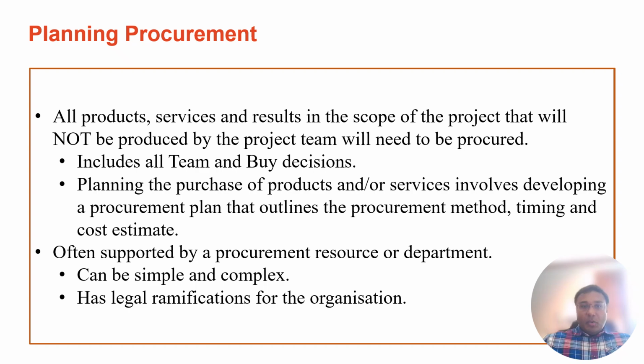We will develop a procurement plan that specifies the methods of procurement, timing, estimated cost, and who's going to do what, probably the responsible parties for delivering the work packages or a certain part of that project. And because procurement can involve contracts, there are definitely legal ramifications. So proper planning is not optional, it is very much essential. So what is the purpose of doing the planning? It's to determine what to procure, how to procure it, when to procure it, and who is going to deliver it.